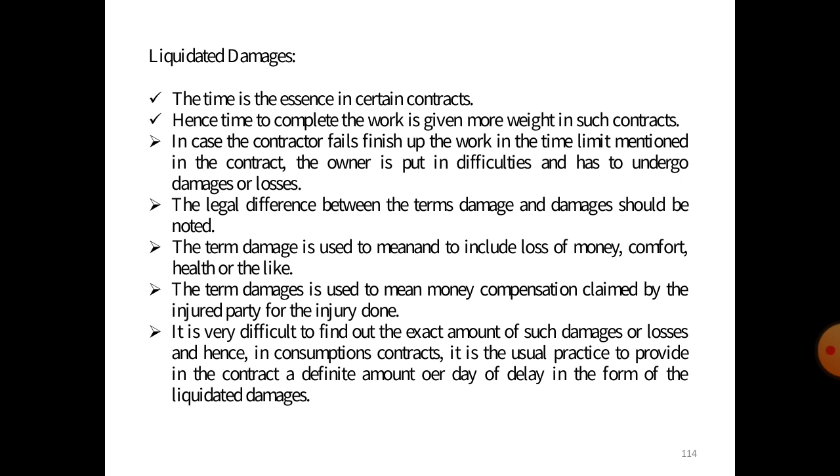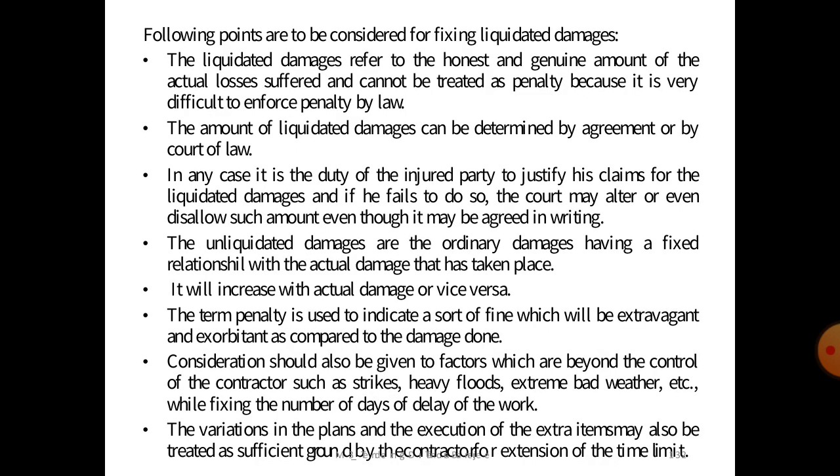It is very difficult to find out the exact amount of such damages or losses, so in construction contracts it is usually practiced to provide in the contract a definite amount per day of delay in the form of liquidated damages.